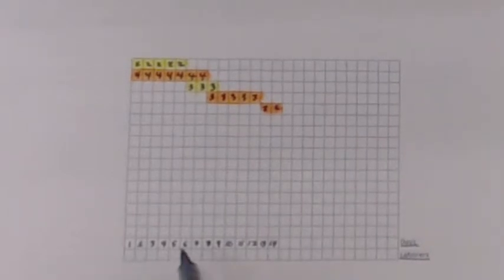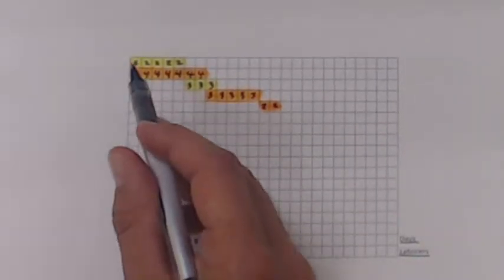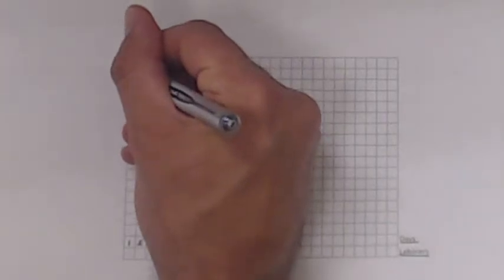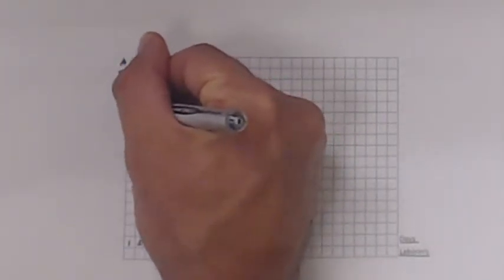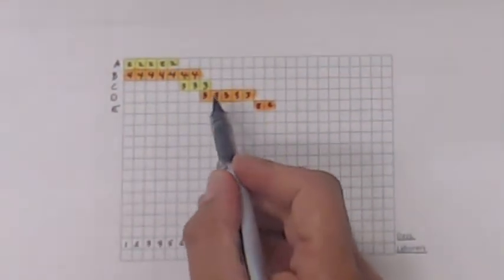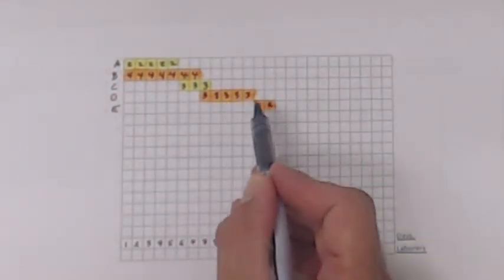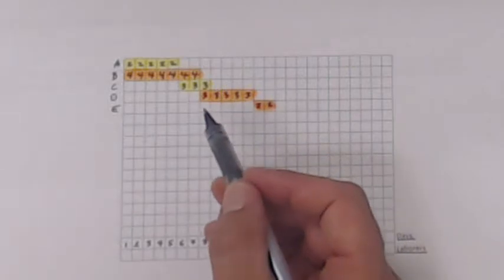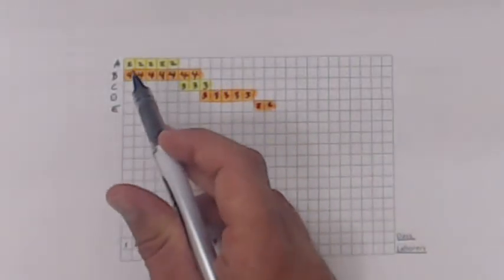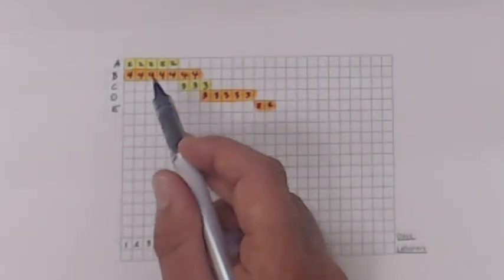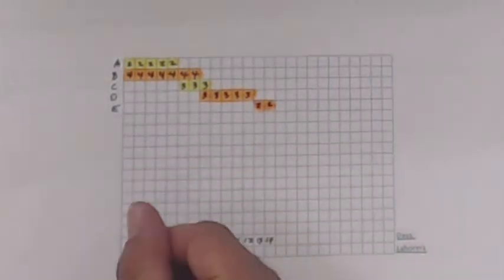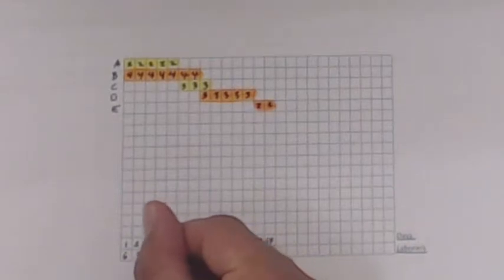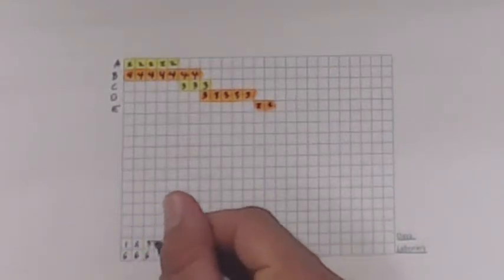All right, so you've got the 14-day schedule. You've got activity, excuse me, I should be labeling these. This is activity A, activity B, activity C, activity D, activity E. And that's according to what you just mapped out in the critical path. So the orange is critical, the other two are non-critical. Now all I have to do is add up the number of employees I have on each day. So 2 plus 4 on day 1 gives me 6. I have the same thing on day 2, on day 3.